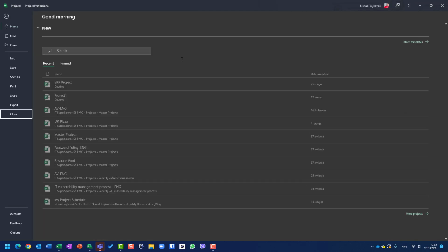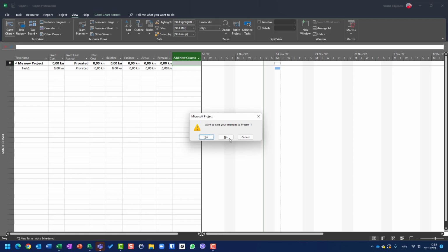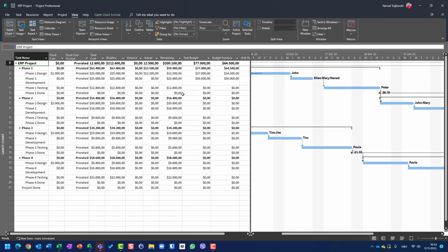Why? Because when you create a custom field in one project, it is not applied to all projects. So when you want some custom field or customized table to be included in all future projects, you should customize the global template. And that is what I'm going to show you in my next video.